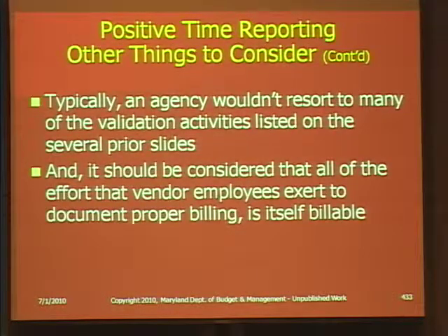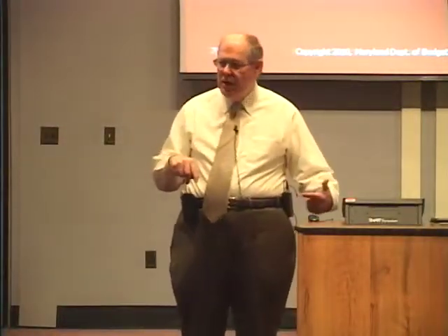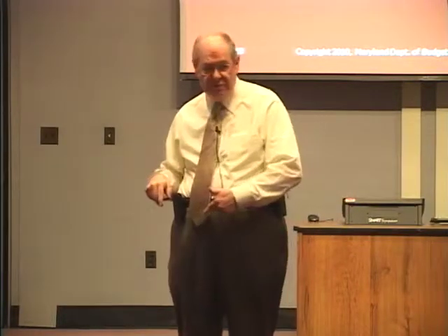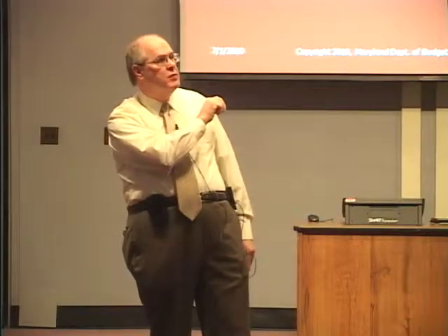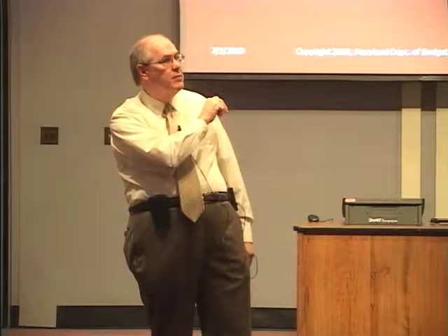Typically, an agency wouldn't resort to many of the validation activities listed on the prior slides, and it should be considered that all of the effort that vendor employees exert to document proper billing is billable. If it's time and material, and this is a consideration, all the information that they have to do to validate the accuracy of their bills is time spent under the contract and is billable in and of itself. So these are considerations. Now I'm going to go in a slightly different direction, I think.